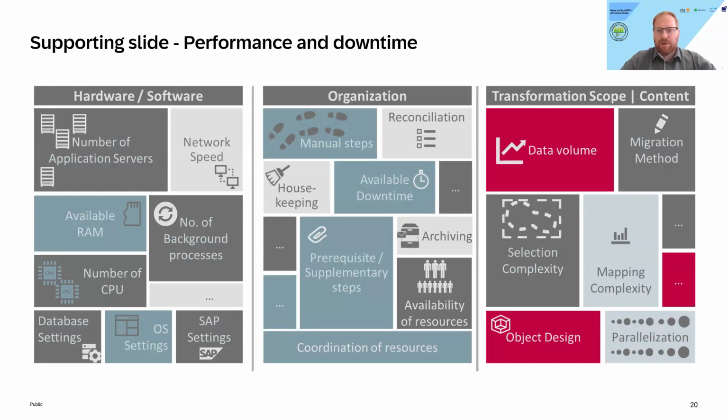One of the largest projects we're currently running as one of the providers is basically a multi-year program. I think it's a six-year program accumulating to an overall amount of 500 company codes. Every year we started off easy with a couple of dozen company codes in the first wave. Then in the second wave we added up to 50, then to 100, and so on and so forth. So yes, that's absolutely possible. And specifically for larger corporations and larger programs, it's a common theme to think about a wave-based migration versus a big bang, which would feature exactly what you were asking for.